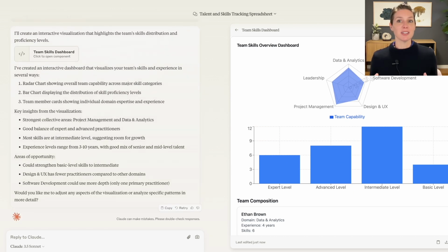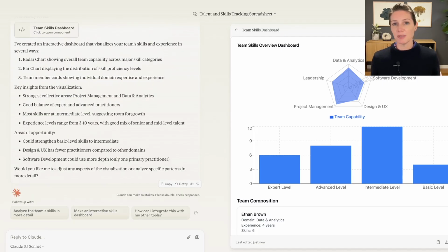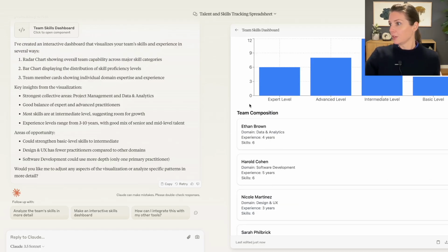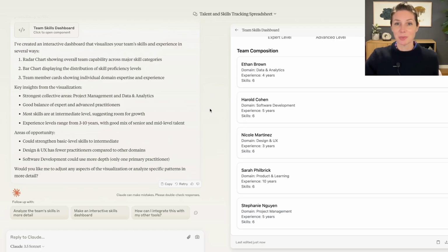So imagine this, you take an hour or two, sometime around project kickoff time, to set up a visualization like this one that captures all of the people who are connected to your project. And now you can instantly identify who has complementary skills for specific project needs. You can balance team composition when assembling project teams. You can spot areas where skills overlap, enabling backup coverage for critical roles. You can visualize single points of failure where critical skills rely on one team member.